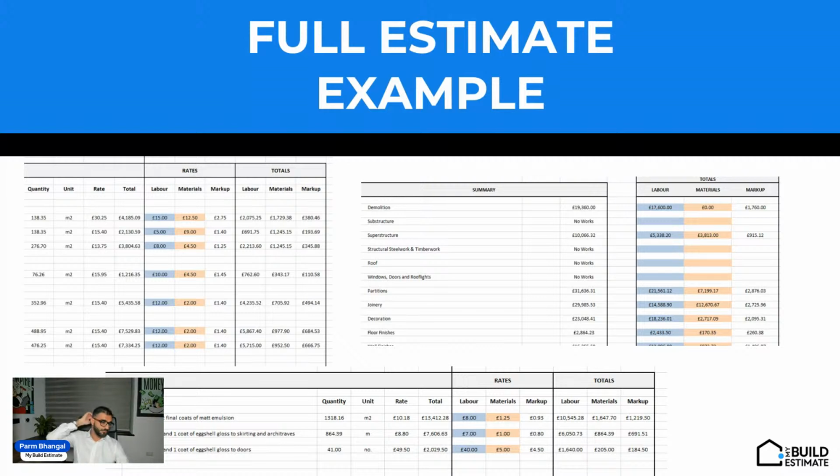When you do a full estimate with us, should you choose to use our materials list service, what I always suggest is that you ask us to remove all the figures, and leave the quantities in. We'll do your materials list. You then send that materials list out to 3 to 5 materials suppliers, and you look at negotiating the best rates.